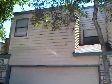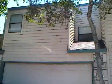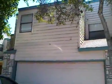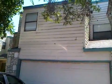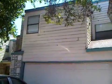There's going to be several things that will be the homeowner's responsibility. A list of those basically is the sag in the front garage here, any rot under the porch ceiling, not including the actual porch ceiling, but any kind of subframing. Any stud rot that we find in the walls as we walk around here. There is some pretty significant water damage. So any inside interior wall space stud rot is going to be the homeowner's expense. Any insulation needs will be covered by the homeowner.